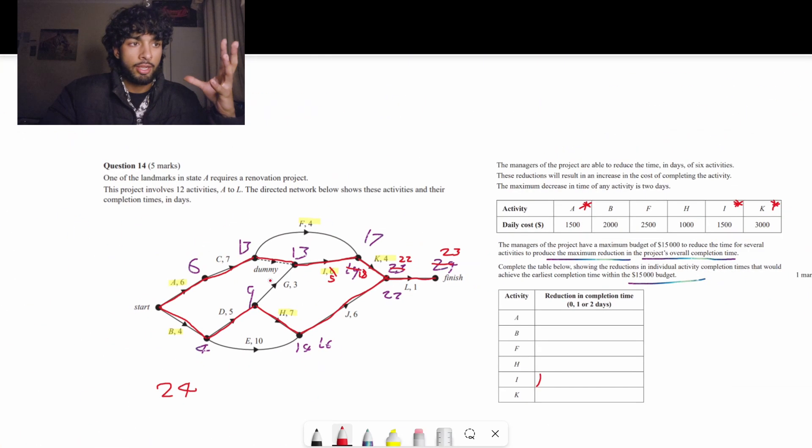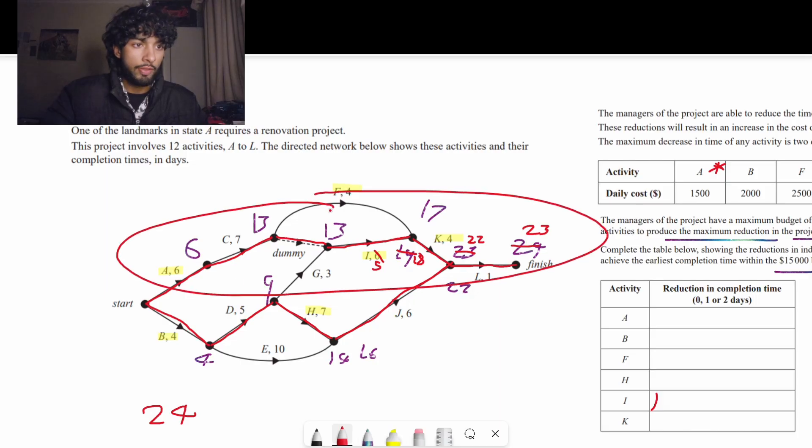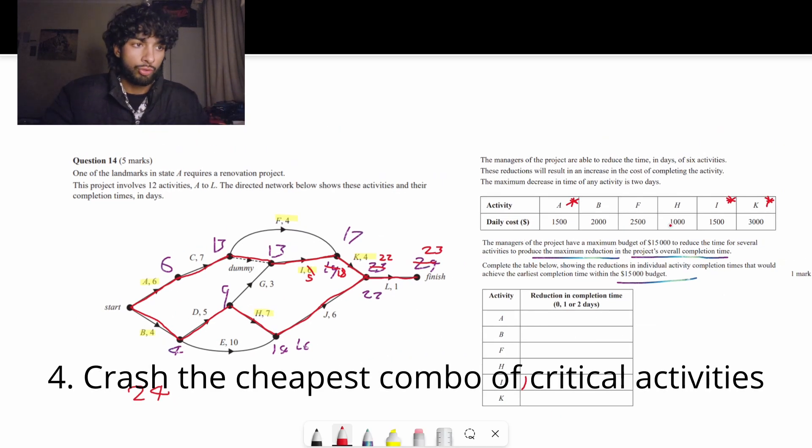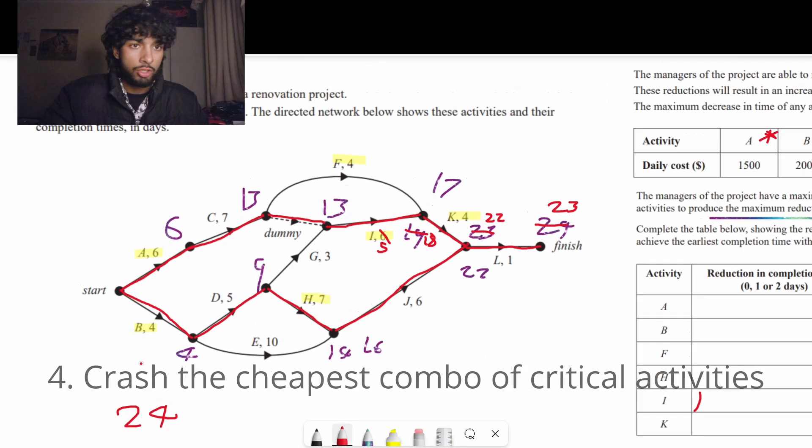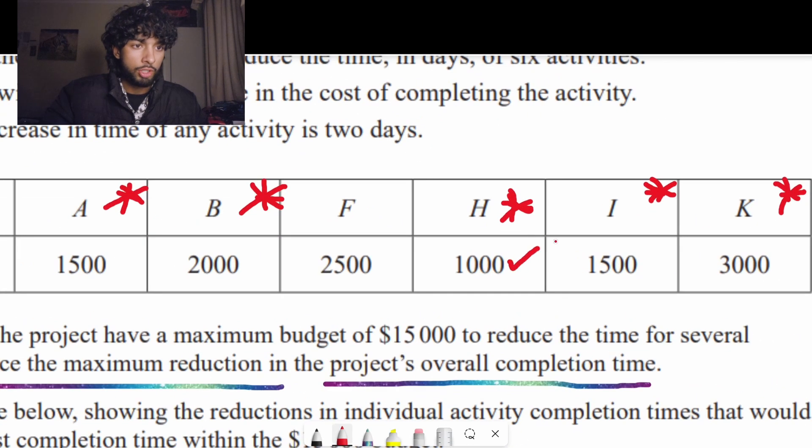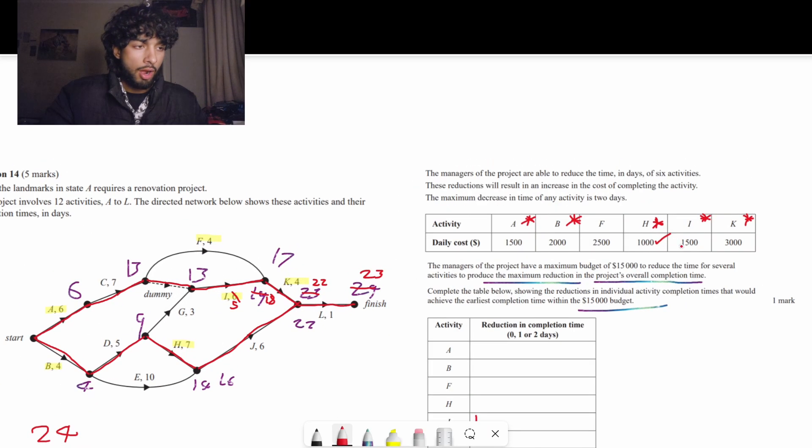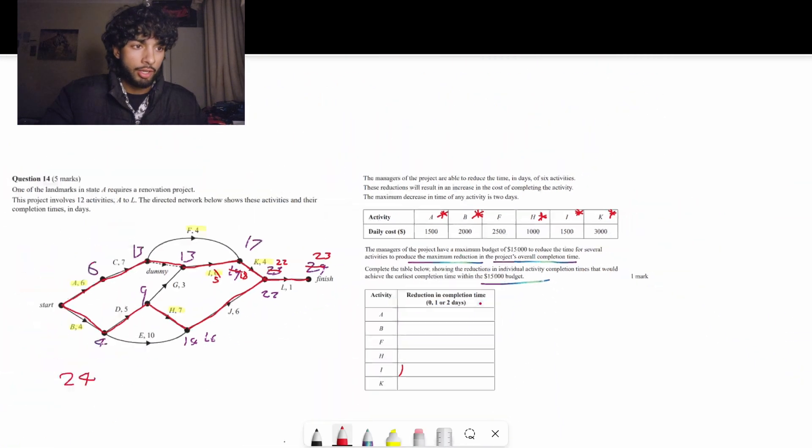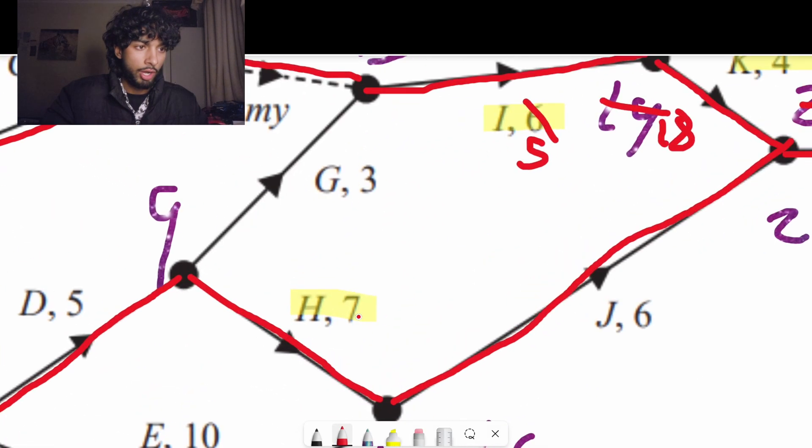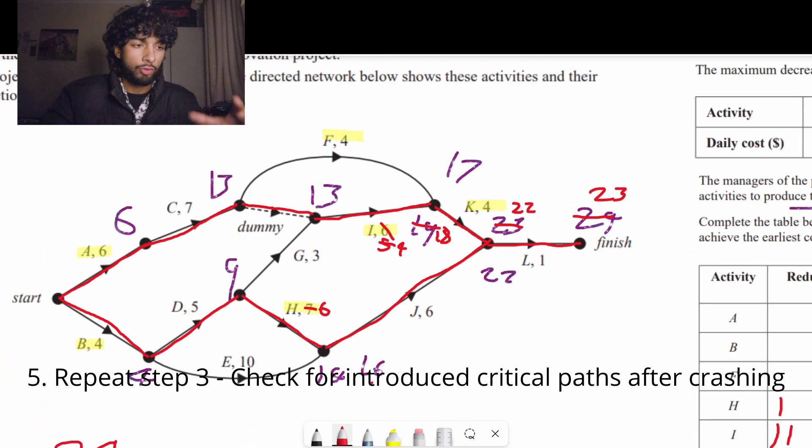What this essentially means is that we can't crash one thing at a time. We have to crash two things. So we have to crash one thing on this pathway at the top and then one thing on this bottom pathway as well. We're going to choose the cheapest combination of those two. Bottom, we have b and h. Cheapest option is h. And then for the top pathway, we're just going to roll with i again.